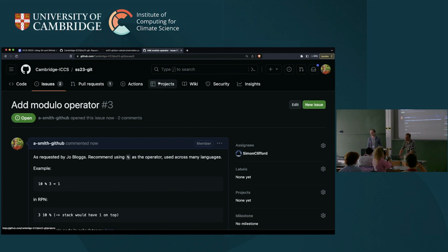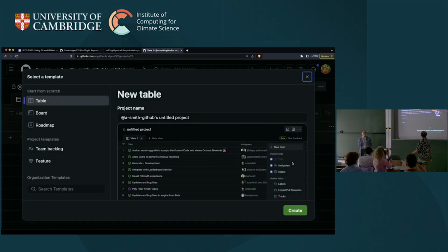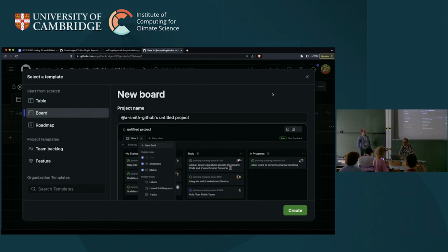One more thing that I like to do when I approach a project, and that's because I spent all those years in industry, it wasn't that long, is that I like to create project boards. That's because I like this backlog view, this task view. At the top of GitHub, you have this projects tab, and you can link an existing project, and you can link projects across multiple repositories. They aren't tied one-to-one like that. Or you can create a new one, and we'll do that today, just quickly make a new project. It gives you a few view options. You have your backlog view, with your issues and pull requests stacking up, or you have this board view, which looks a lot like the classic Scrum, Kanban style thing.